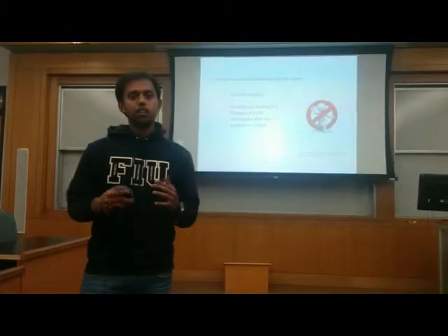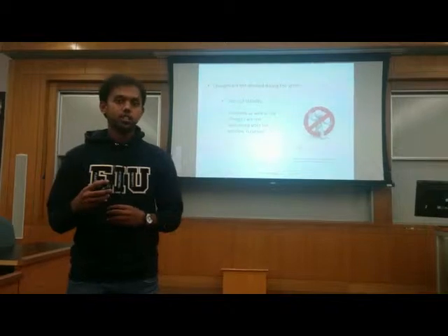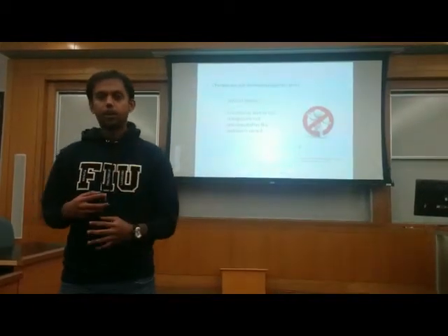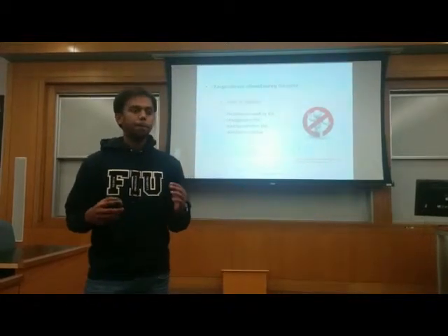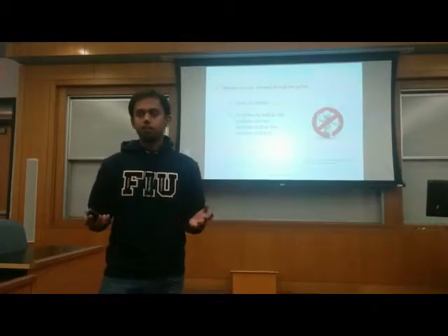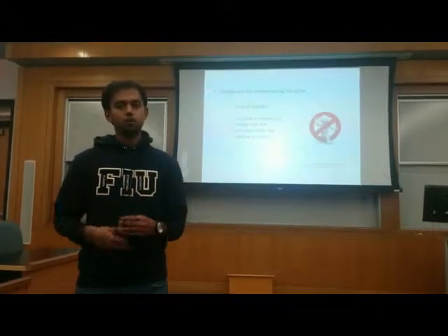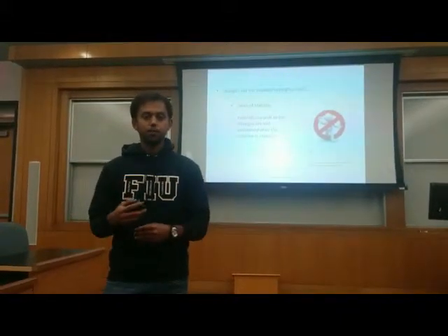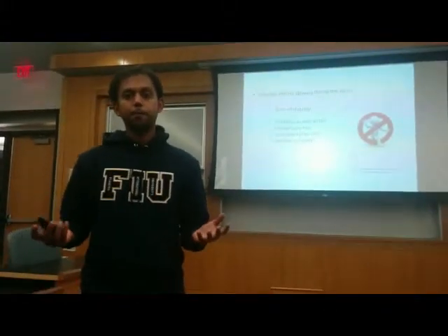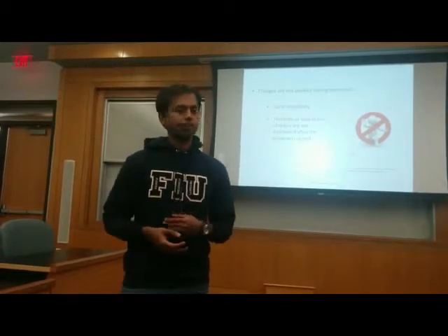In the same way, each and every user story will have priorities. So priorities as well as changes cannot be accommodated in the middle of the sprint. The product owner has to wait till the end of the sprint, unless it's an exception case. If, for example, the particular change the product owner is coming up with has a huge financial impact or a huge business impact, then that particular change can be accommodated during the sprint.